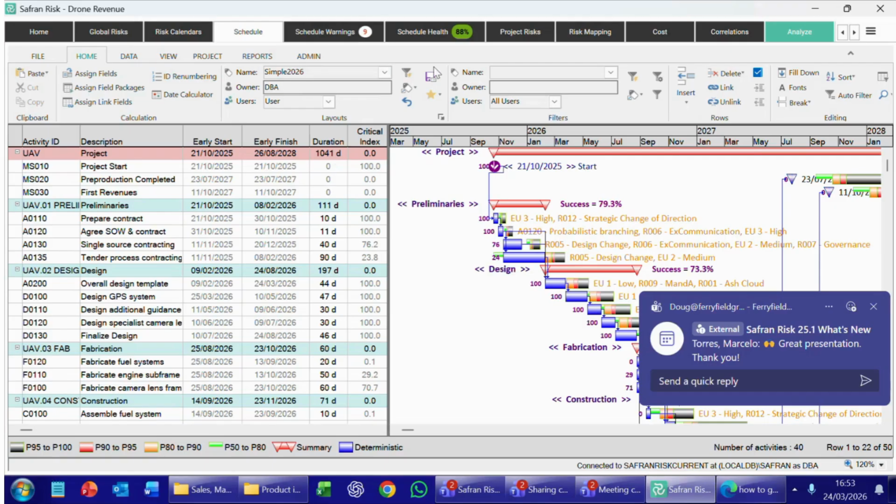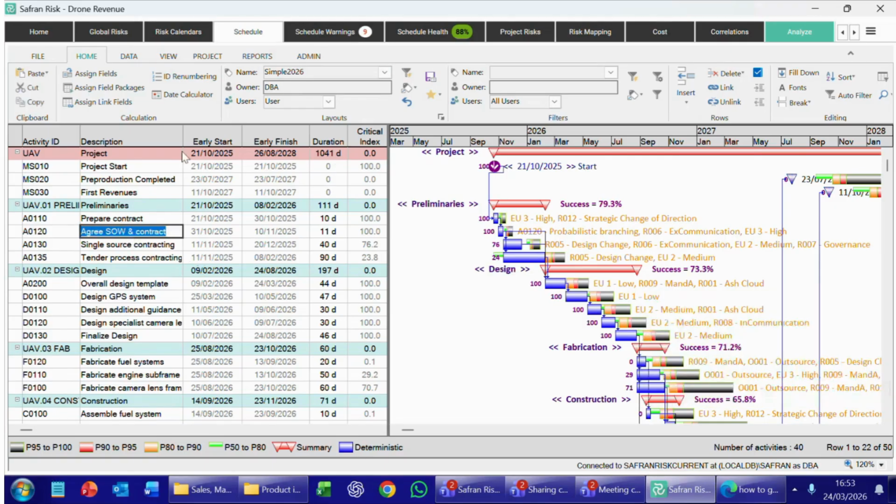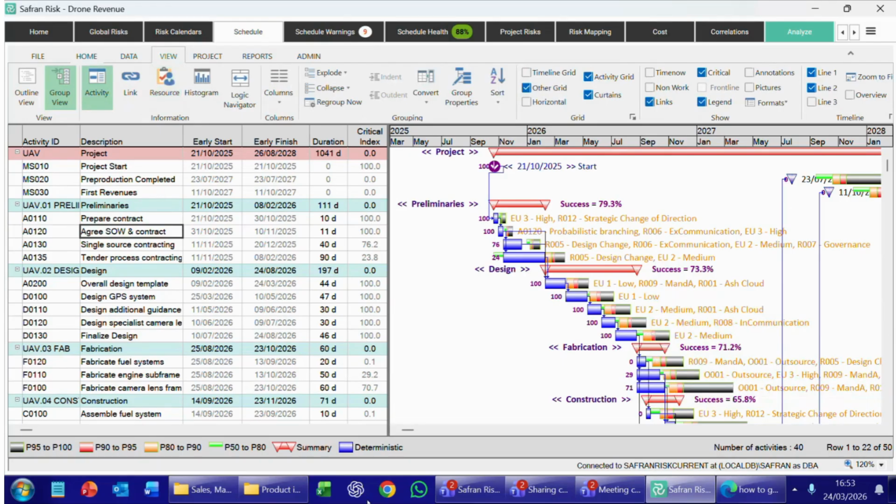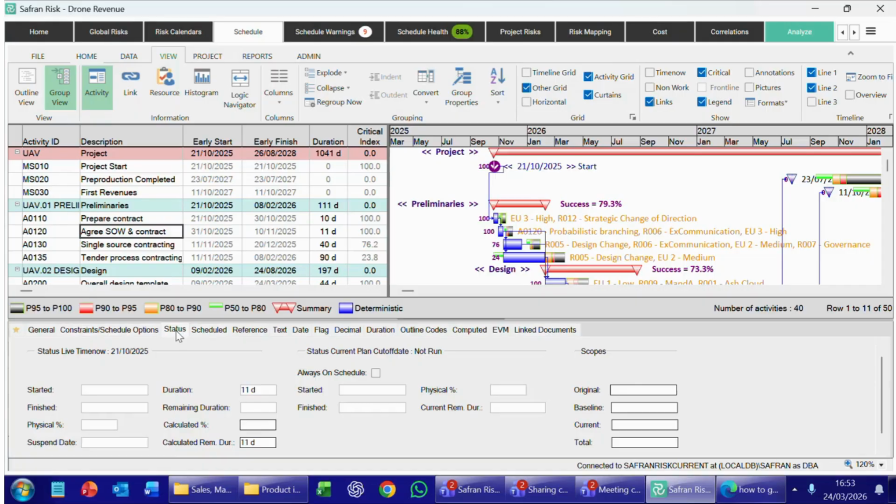And historically, if I just pick an activity, there is a particular tab that says remaining duration analyzed, I think. Well, this one down here. So once we go into execution, we might report some progress on an activity. And let me see if I can do it live, which is a recipe for disaster. But let's see if I can say that maybe I've done 50%. Let's see if this works. So now I've got 6 days remaining.